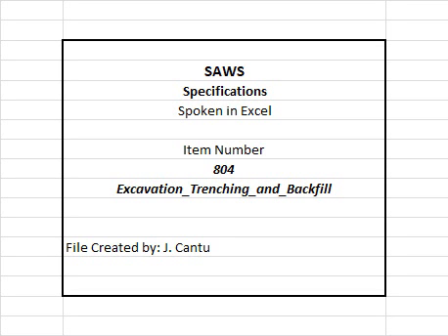L. The contractor shall maintain a daily log of these readings and submit them to the inspector before payment. M. No direct payment shall be made for costs associated with dewatering. N. All costs in connection therewith shall be included in the applicable contract price for the item to which the work pertains. 5. Backfilling. Trenches shall not be backfilled until the construction structures or appurtenances, as installed, conform to the